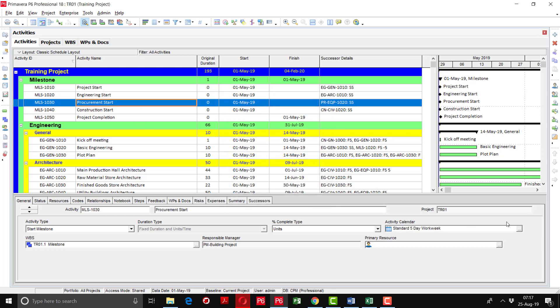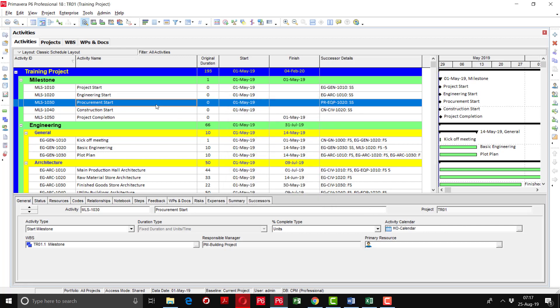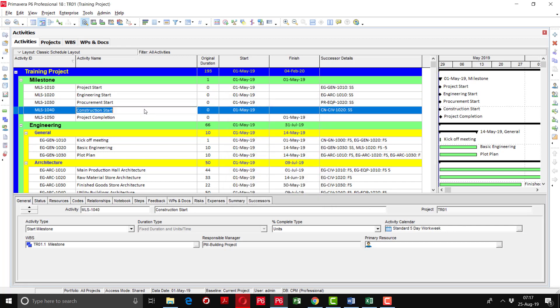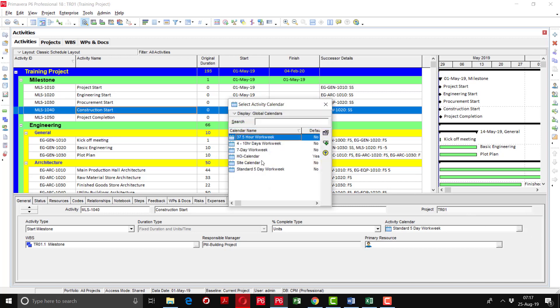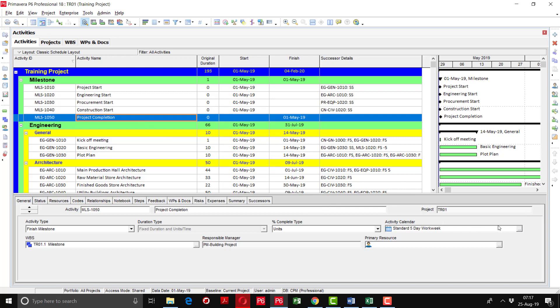Procurement is also going to be conducted in the head office so you are going to assign it as it is. Construction obviously will happen on the site so I should assign the site calendar. And project completion you can assign head office calendar, no issue.